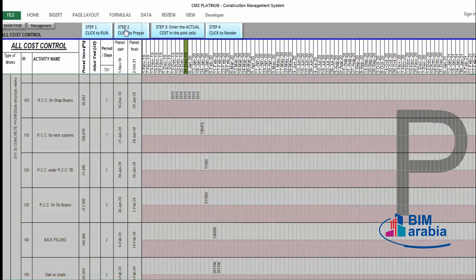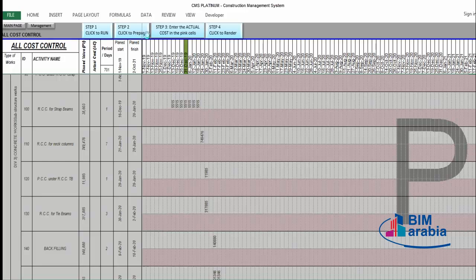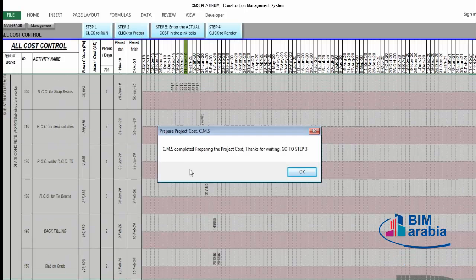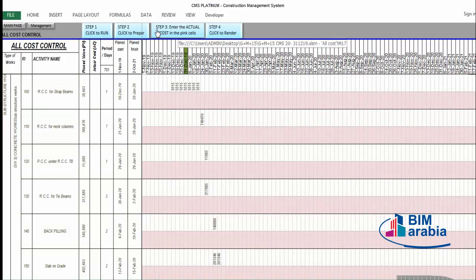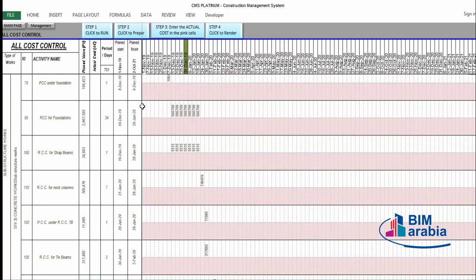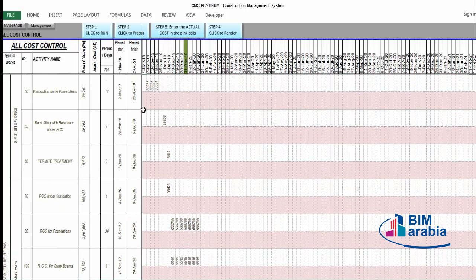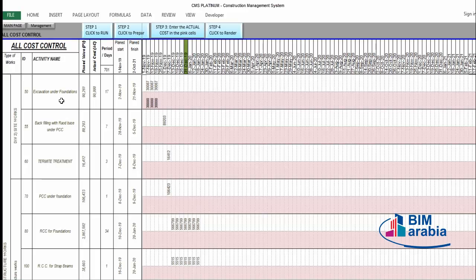Step two is complete. CMS is preparing the project cost. Go to step three. Step three: enter the actual cost in the blank cells. We now need to insert the actual cost according to our expenses. We find the actual cost for the execution: approximately 90,000 total for the first month.